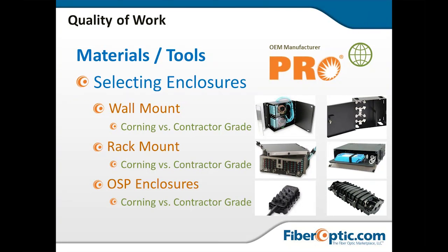Instead of having to open up this enclosure on the right every time they have to add a customer, they can basically take, let's say, a 100-meter drop cable, screw it into one of those ports, run it over to the side of the house, screw it into the NID on the side of the house, and be done. And on the labor rate there, yes, the connector costs more, but the labor rate was a third to a quarter, so it just made more sense for them to proceed in that fashion. So some of the things to consider for that.